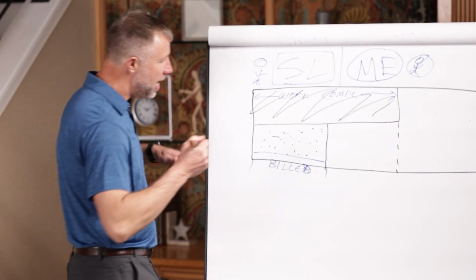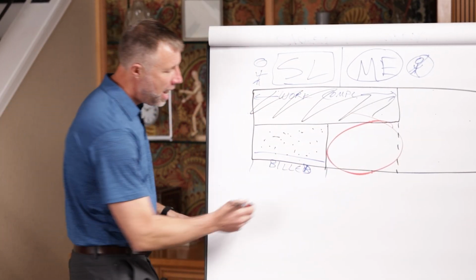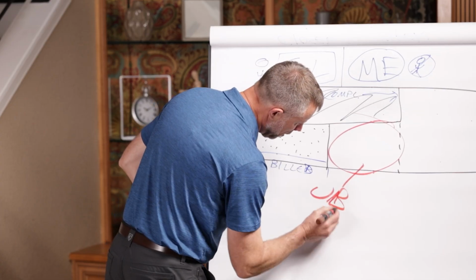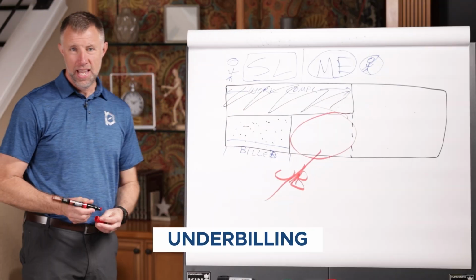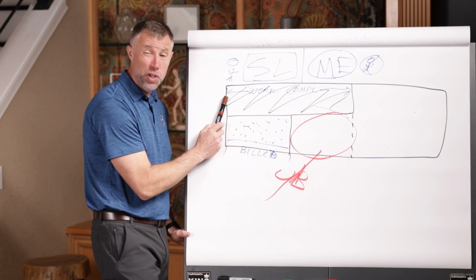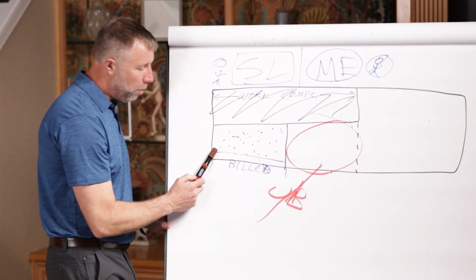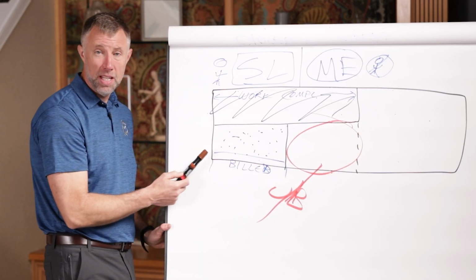So if we take our red, this is where the symptom is right here. This is where you start to feel what accountants will call, let me just put a UB, underbilling. And so we have underbilled the work that has already been completed, which means we've usually spent this money. I know terms can come and go in and out, and we've only billed this amount to be able to get this amount of money back.